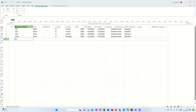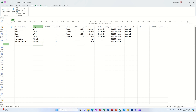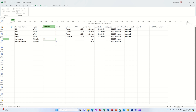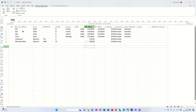Let's go for some equipment — computers and Microsoft Office. Now these are going to be material resources. For material resources you can put a label in there — that's what's going to appear on the Gantt chart. So 'PCs' and 'MSO'. Let's put a price on there: every time we use a computer it's going to cost £50, every time we use a license also £50. You could have put 'painters' at 300% — that would equate to three painters; builders at 500%, five builders. If anything on this resource sheet goes red, it means you've over-allocated them on tasks and you've got to sort it out.